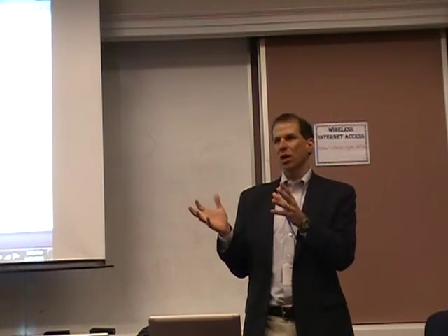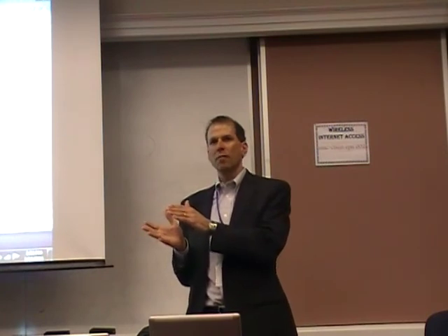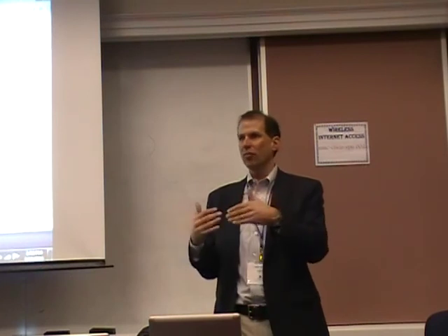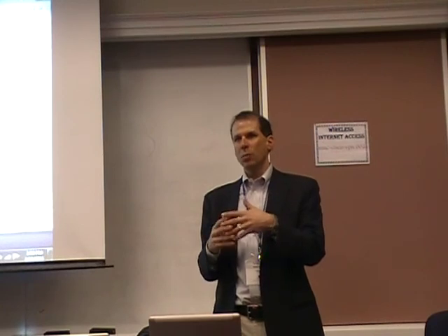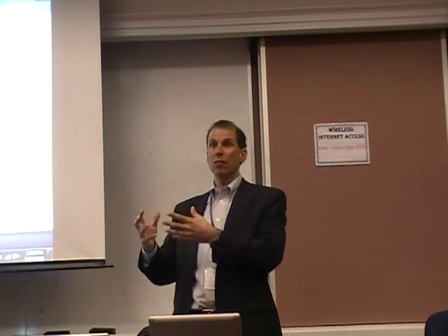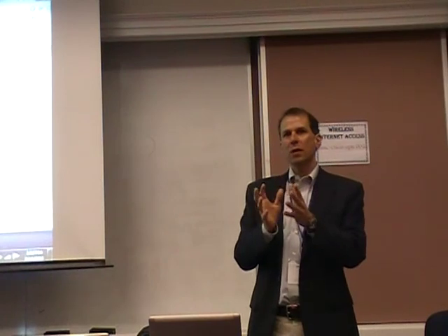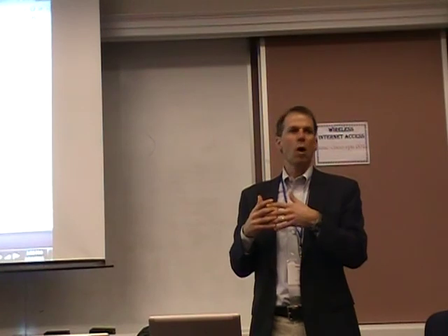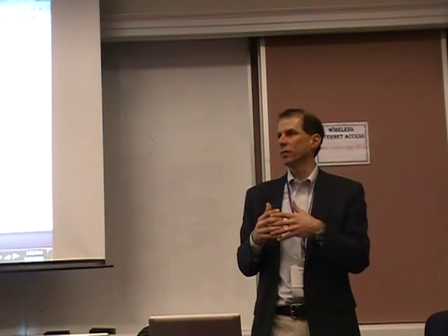rest on. My suggestion for internationalization, since it is so time critical, is that, if possible, have your project manager have a good engineering background, or at least be very tightly integrated with your project lead. And your project manager then becomes somebody who's doing things like the counting of time, the counting of money, the projection based on past performance. But the senior engineer is really key, because these projects tend to be a little dynamic as you go, and so you want that deep engineering knowledge. It is much more of a guarantee of success.